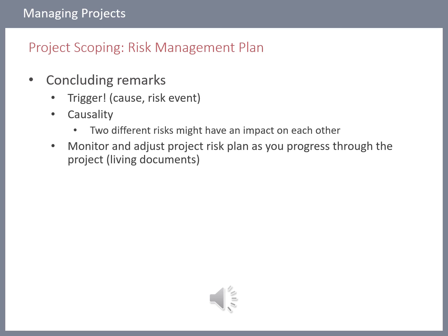You went through a whole analysis process and realized that it has a very low equivalent value, because the probability that these cabinets might fall over is very low, although the impact might be fairly high. Someone gets hurt or maybe killed. The equivalent value is low, so you say, it's all right, I'll just take it, or maybe put a contingency plan in place. Next to that, you've identified another risk.